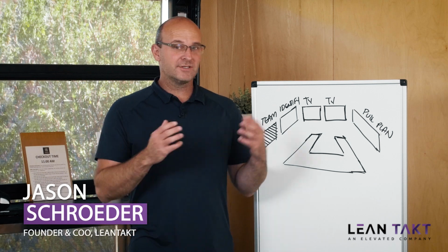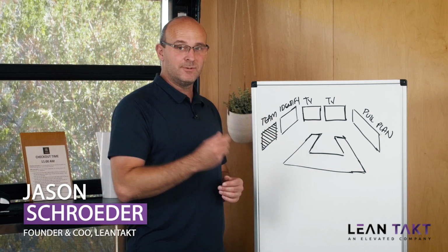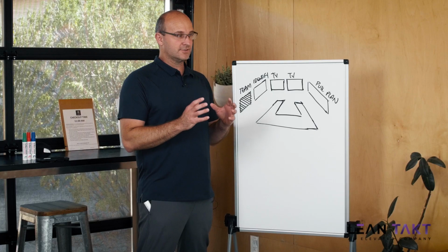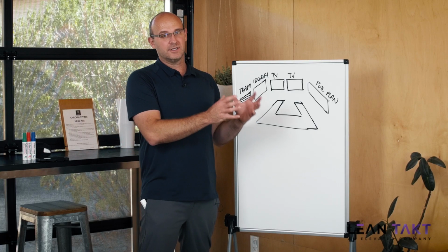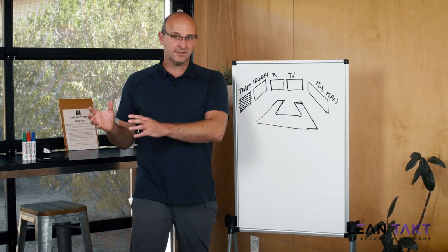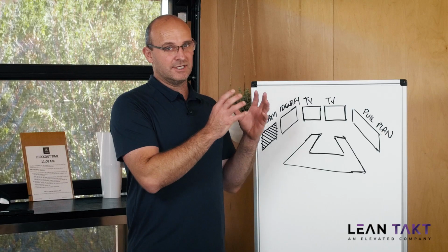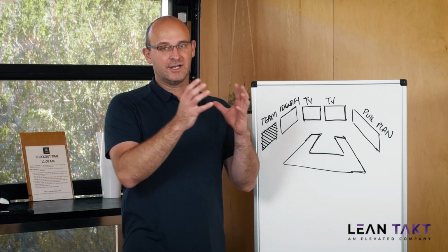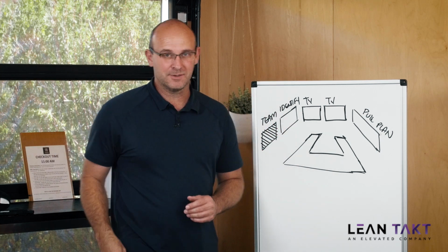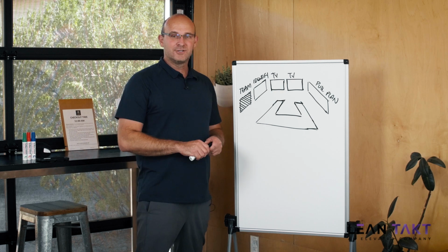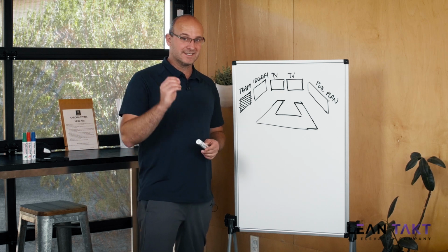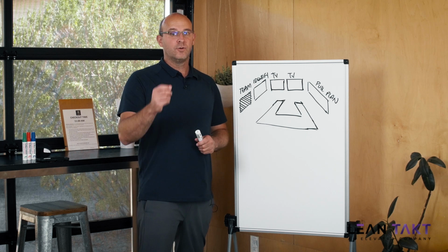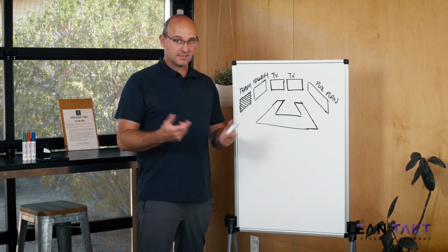In the previous two videos, I talked about the team weekly tactical and the strategic planning and procurement meeting. Those meetings were designed to set up the project management team so that they can enable the trade partners. The strategic planning and procurement meeting was to make sure that your master schedule and your procurement system enabled the trade partners. In this meeting, the trade partner weekly tactical is really designed to make sure that we are doing the work of the last planners with the last planners as a collaborative team.